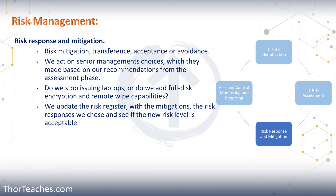This is where we might choose not to issue laptops, or we don't build that data center in an area that is prone to flooding. And we do this in very close collaboration with the risk owners and the people who own the systems that we are securing.